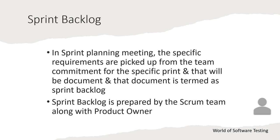The sprint backlog is prepared by the scrum team during the sprint planning meeting and contains the list of product backlog items the scrum team has selected to deliver in the upcoming sprint. It also includes the plan for delivering those items and a sprint goal summarizing the purpose of the sprint. Basically, the sprint backlog states why to develop, what to develop, and how to develop.